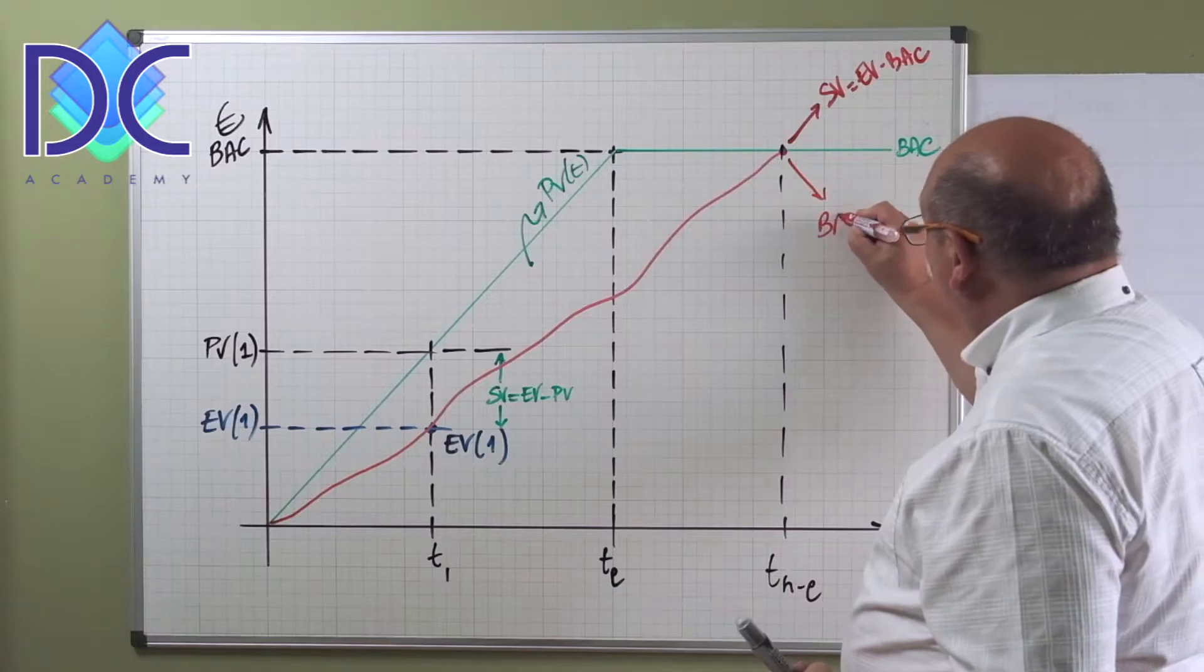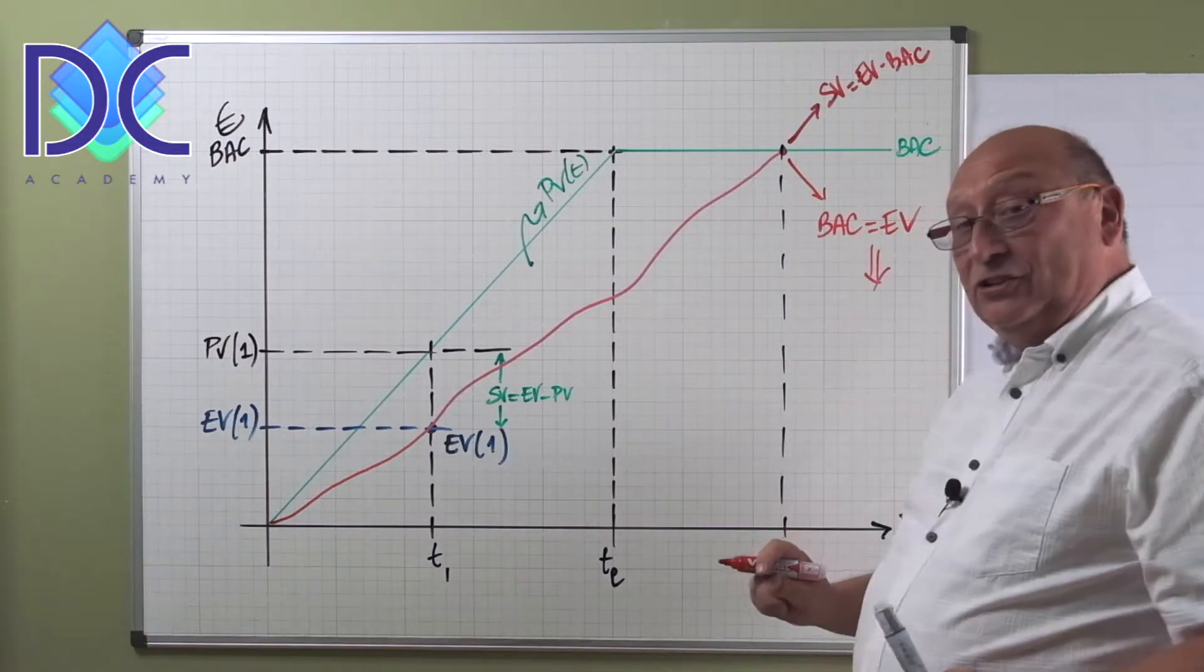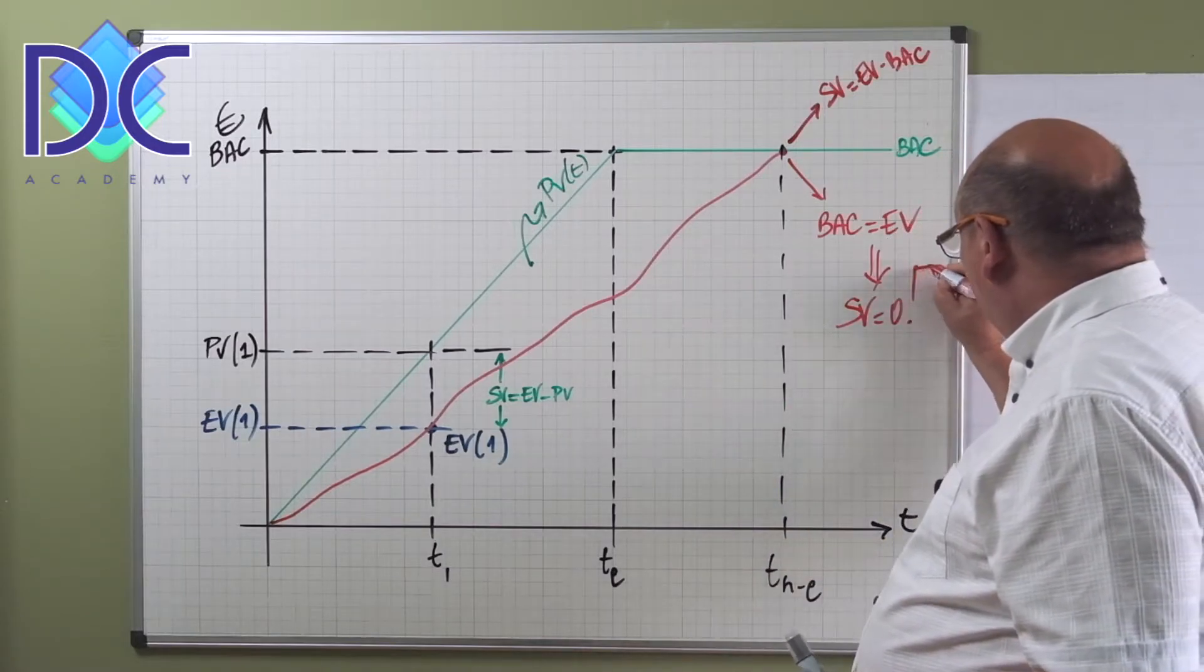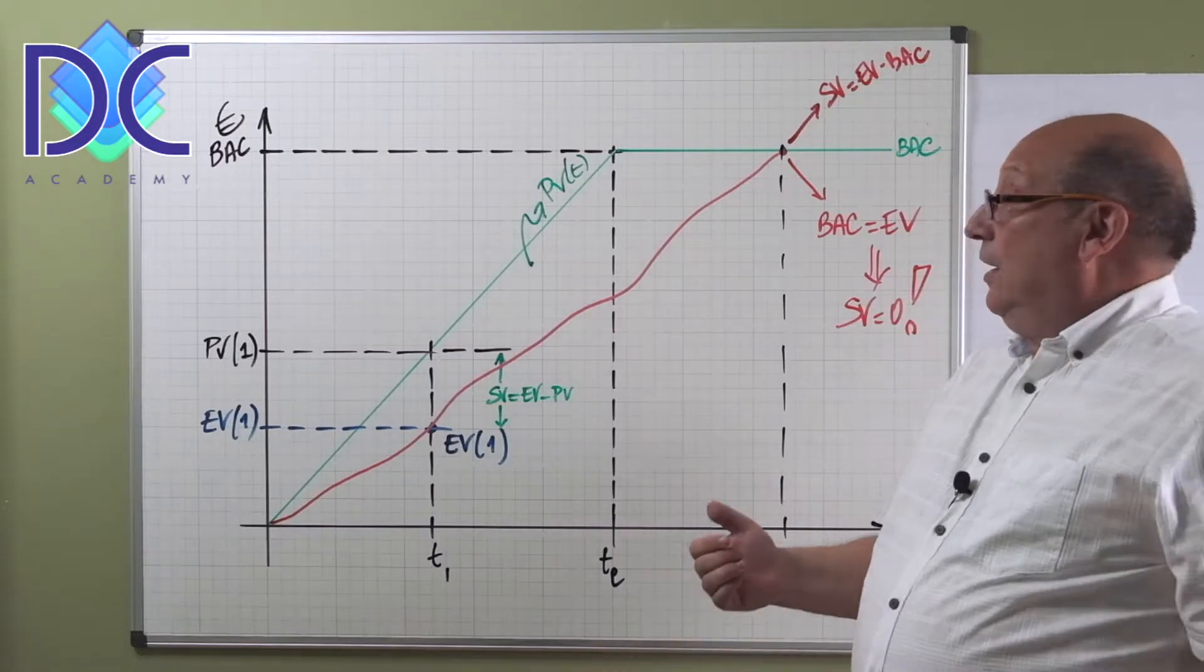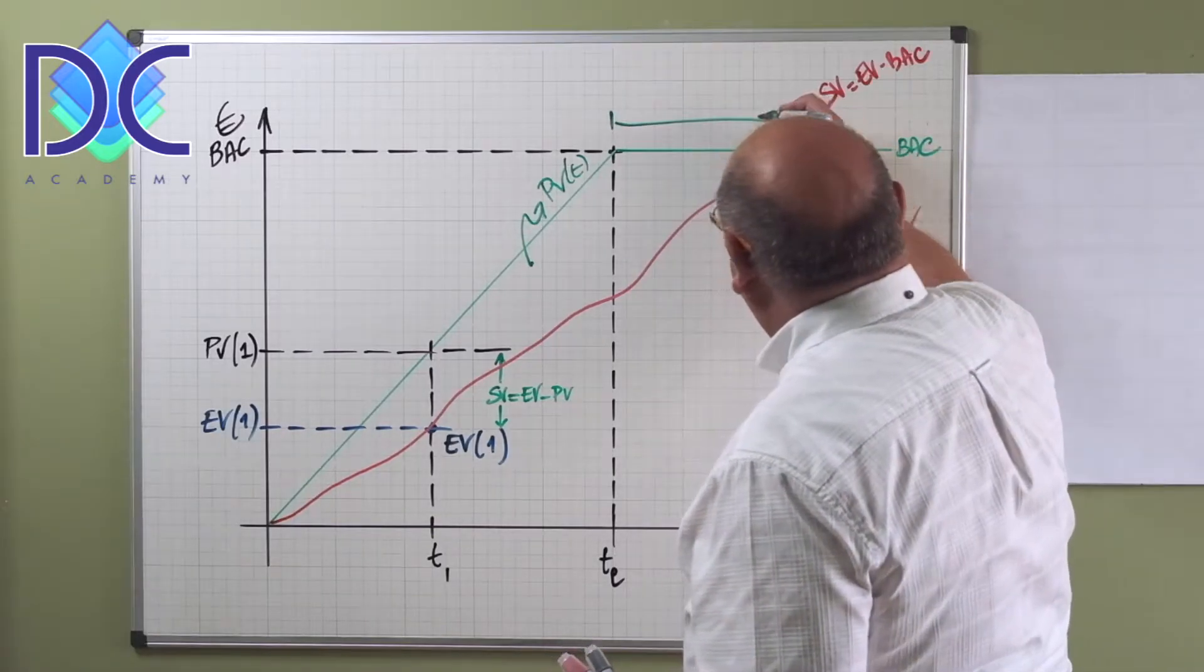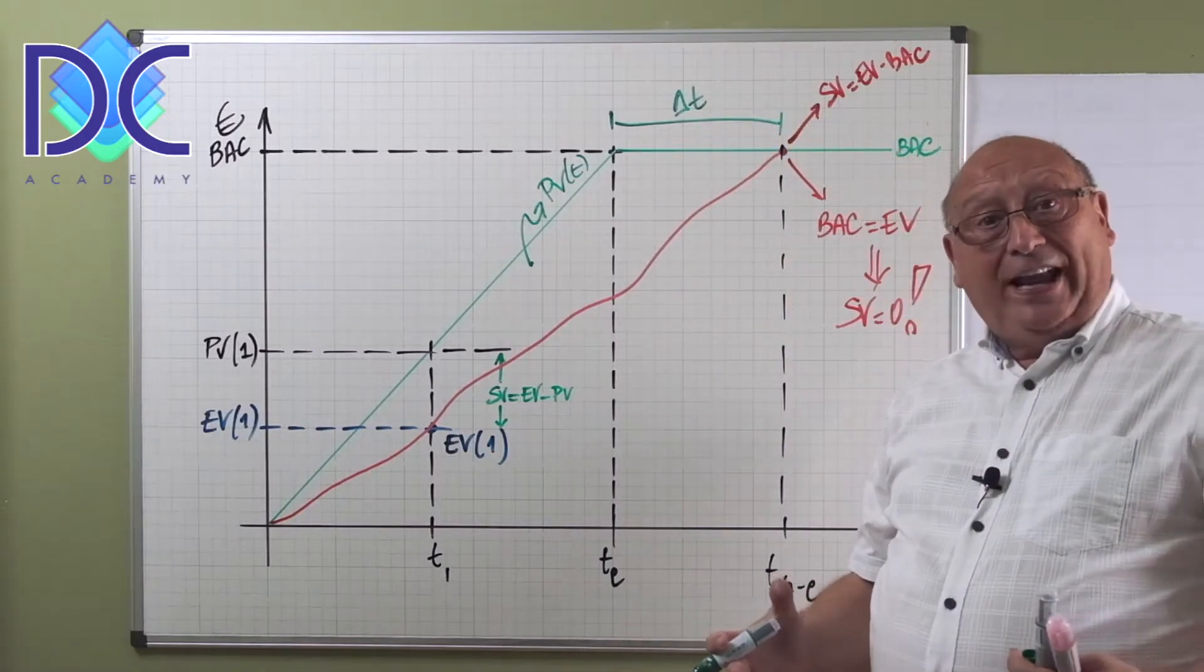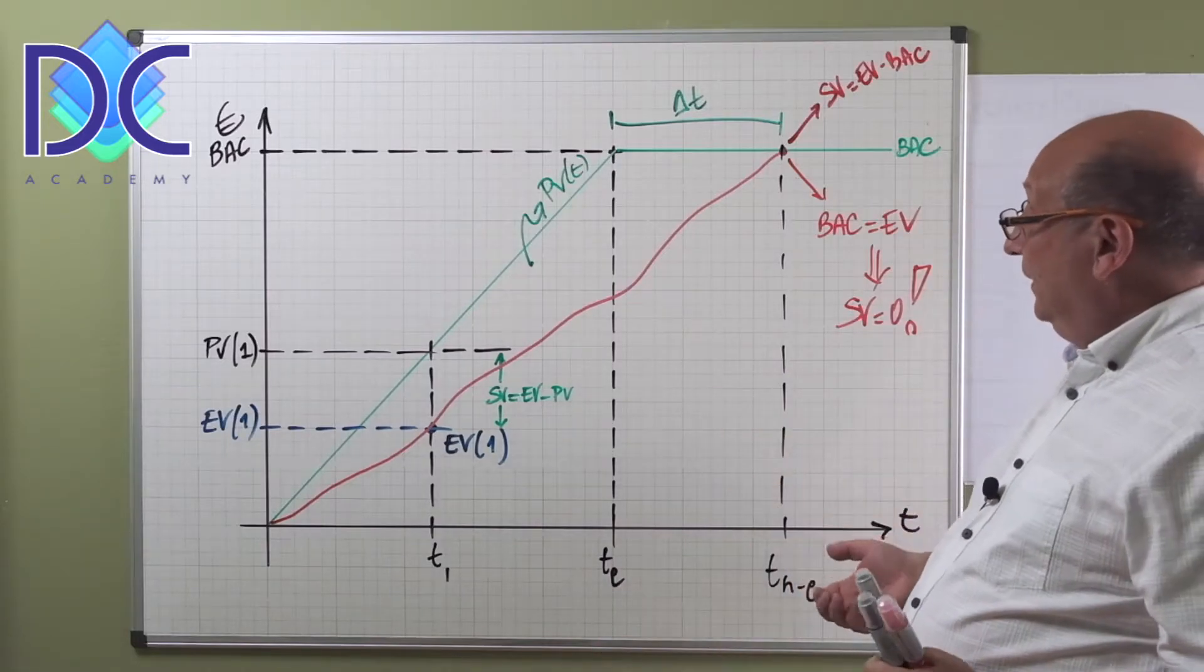Now what happens here when we calculate the schedule variance? The schedule variance is still earned value minus BAC. Now in this case we finished everything, so we earned the totality of the project. So in this point the BAC is equal to the earned value, which also leads to the fact that the schedule variance is zero.